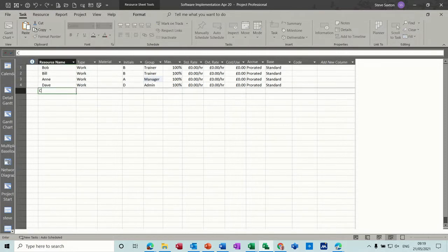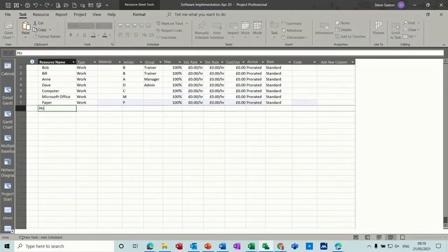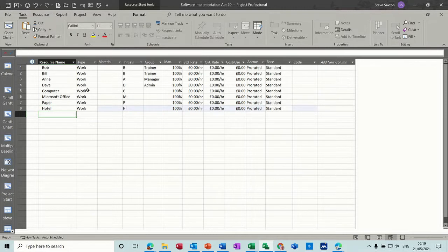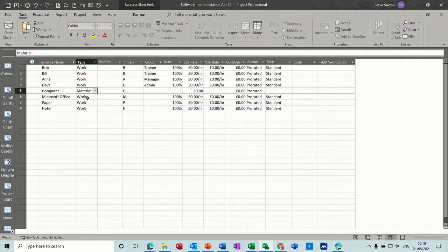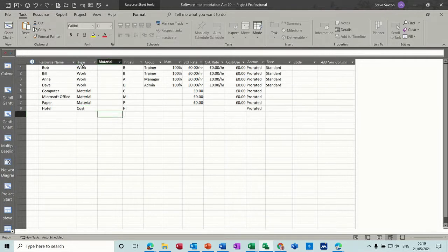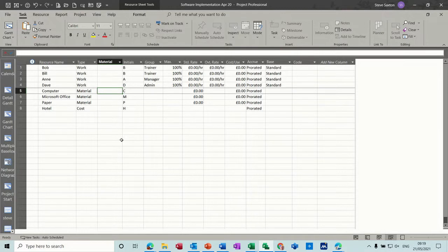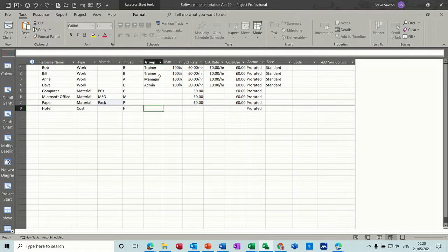Let's say we've got some computers, Microsoft Office licenses, and paper, and then we want a hotel as a resource as well. The computer is a material — I don't want to leave it on Work because it would be treated as a person. So I'll set that to Material. Microsoft Office and paper are also Material. The hotel is going to be a Cost resource. When you have a material type you get a material label column — this is what will appear on the Gantt chart. I'll put 'pack' as the label for paper.